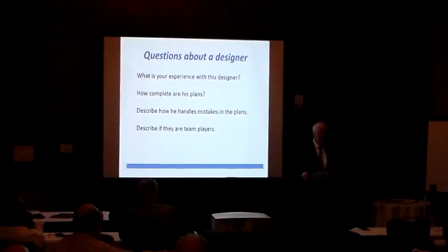Ask them what their experience is. Ask subcontractors about a designer. How complete are their drawings? How hard are they to read? Because I can tell you, if those plans are hard to follow, the prices go up. So ask how hard their drawings are to follow.